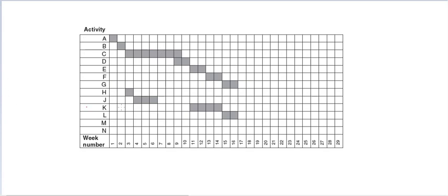For example, he's telling us here that once activity A is complete, then activity B starts. Once activity B is complete, then activity C starts. And activity D, which is basically related to module testing, can take place in parallel with activity C. Activity E is going to start after activity D has finished, and activity E, I believe, is integration testing, right?